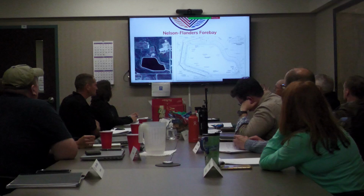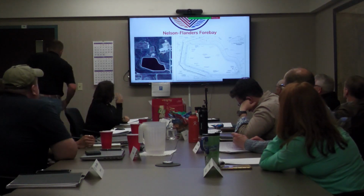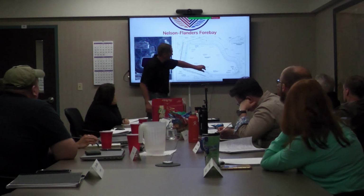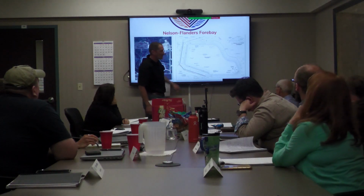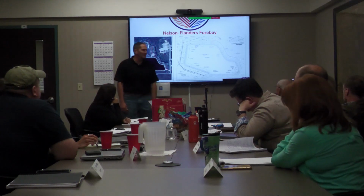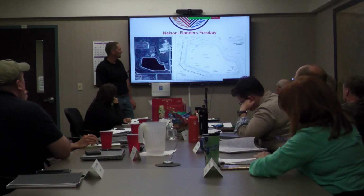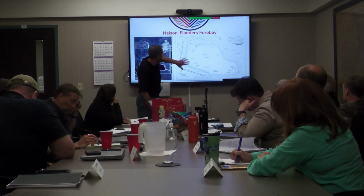So exactly, what are you going to do? So we're basically just going to be bringing in some clay material from the site a little bit further to the east, and just building this in here on the inside. You see how it's kind of built out a little bit here. But are you going to drain this thing completely? We're going to have to drain it completely starting in June. So we think that'll take about a month, and then we want to dry it out so it's easy for the contractor to get in there and work all the material and everything. But it's mainly on this side right here where we're building it up.